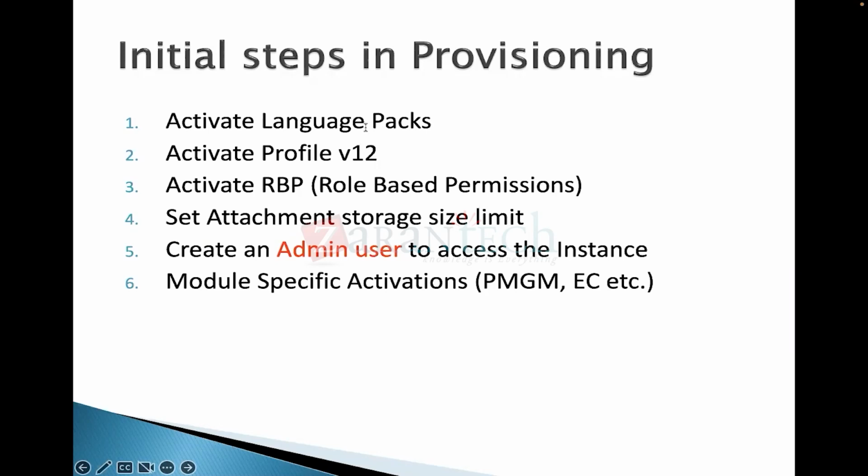There is a question in the chat: when we raise a request, do we get access to all 3 landscapes? For that, you will be raising 3 separate requests. When you want access to the provisioning system of development, quality, and production, you raise the request 3 times. When the project started now in October, you initially need access for only development.